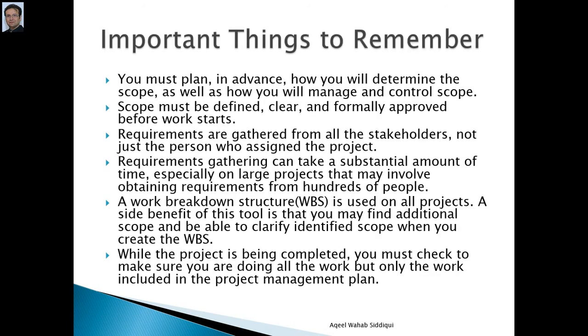So you must learn these important things. You must plan in advance how you will determine the scope, as well as how you will manage and control it. A scope must be defined, clear, and formally approved before work starts. You will gather all requirements from the stakeholders, not only the person who appoints you. You will have to involve your stakeholders. So requirements are gathered from all stakeholders, not just the person who assigned the project.